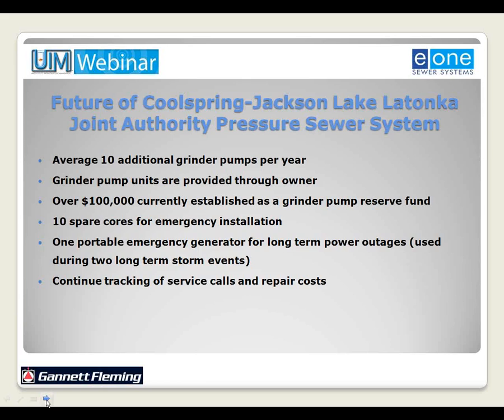In other words, trying to equate the new customers with the original customers. The authority now has over $100,000 established as a grinder pump reserve fund, a 10-year, $2 per customer budget of $120,000. We're already over $100,000 moving into year nine.